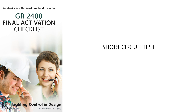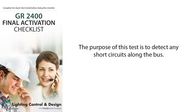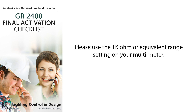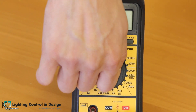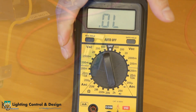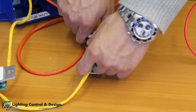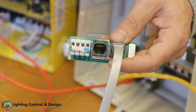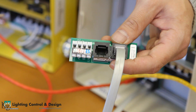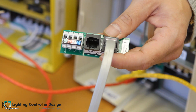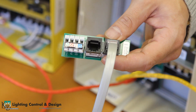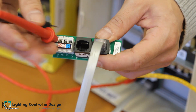The second test will be the short circuit test. The purpose of this test is to detect any short circuits along the bus. Please use the 1k ohm or equivalent range setting on your multimeter. First, remove the data power jumper from the last device. Then go back to the bus checker card and measure resistance across all combinations of inputs — measure from ground to A,